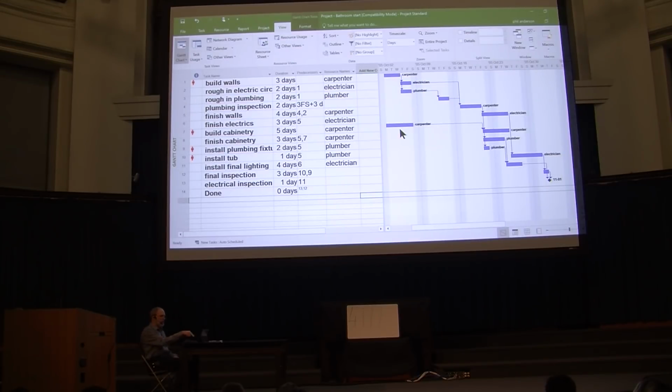Well, I finally realized what was going on, and it was starting to become critical. So I did something like this, and I charted out my time and my partner's time and the time of a couple of other principals. I was actually pretty light. I was only over-allocated about a factor of 6. My partner was over-allocated to a factor of 14. Which means that for every hour he had in his life, he actually had to work 14 hours in order to meet all the schedules. That clearly isn't a workable situation.